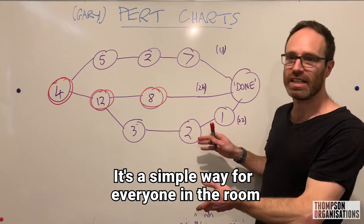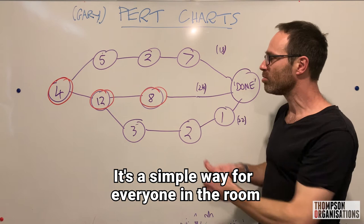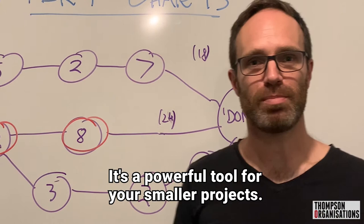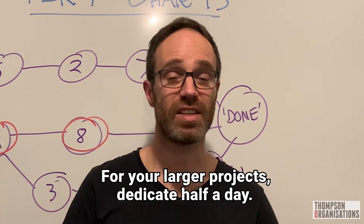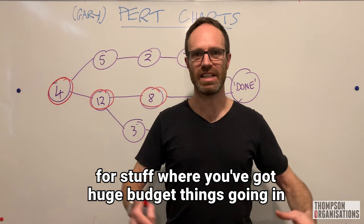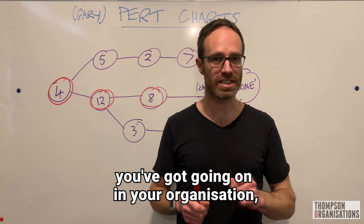It's a simple way for everyone in the room to not only create the project system together, but everyone can visualize the whole project system at once. It's a powerful tool. For your smaller projects, you can knock it up in half an hour. For your medium projects, it can take 90 minutes. For your larger projects, dedicate half a day. You only need the Gantt chart for stuff where you've got huge budget things going in and all this resource balancing, all that sort of stuff. For most of the projects you've got going on in your organization, taking the time to do a quick PERT chart to get things a bit more obvious to everyone, is going to pay big dividends.